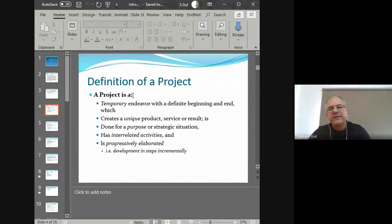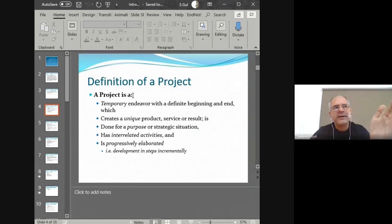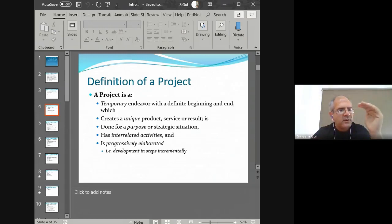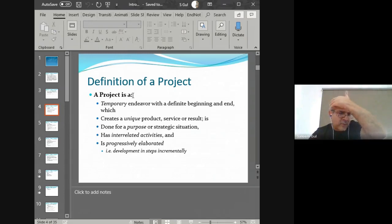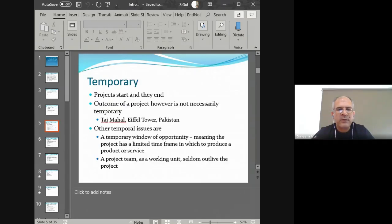Projects also have interrelated activities, where one thing leads to something else — requirements lead to the design, the design leads to execution, the scope leads to the time period, and the time period leads to the costing of the project. And projects are progressively elaborated, which means that as I explained before, your planning level moves from an abstract bird's-eye view and slowly your plans become more developed and more detailed. Progressively elaborated means our plans are incrementally made in more and more detail.